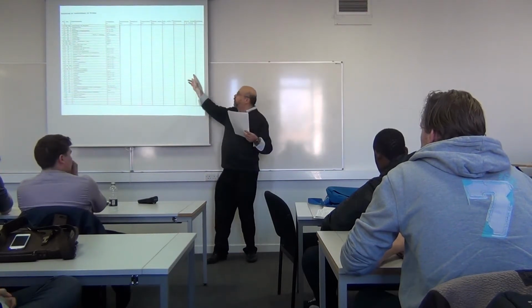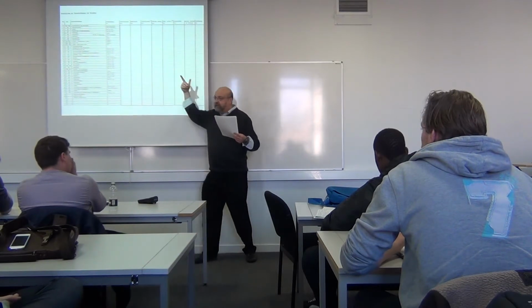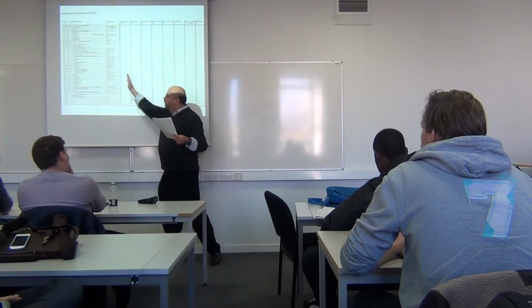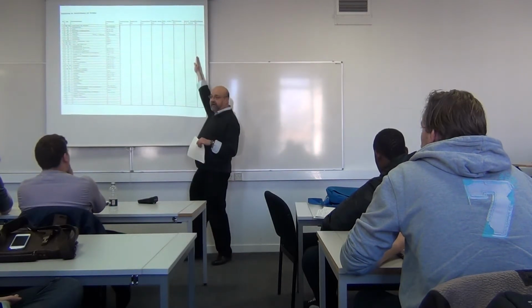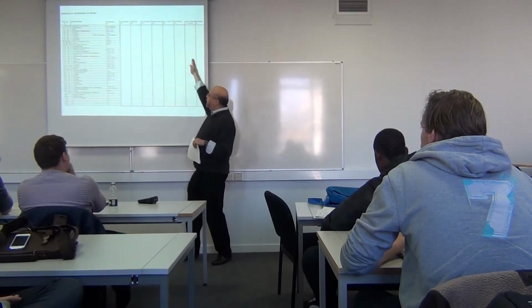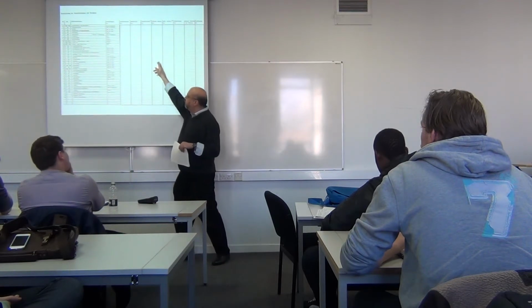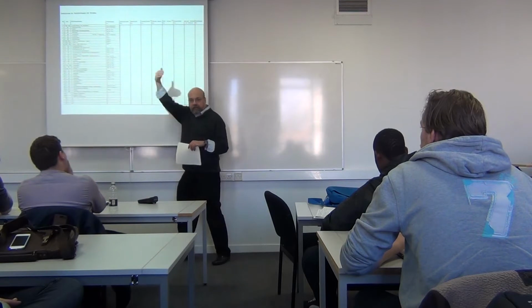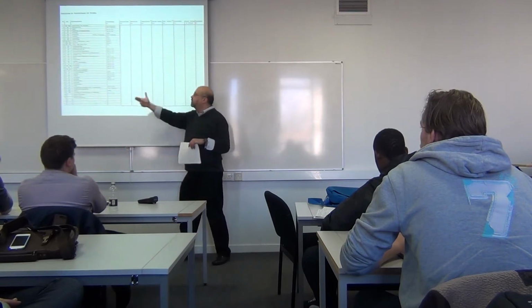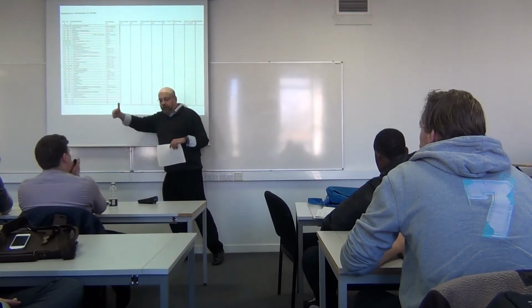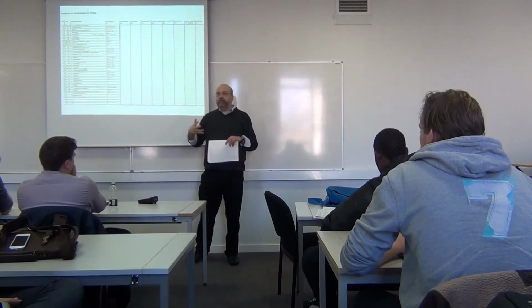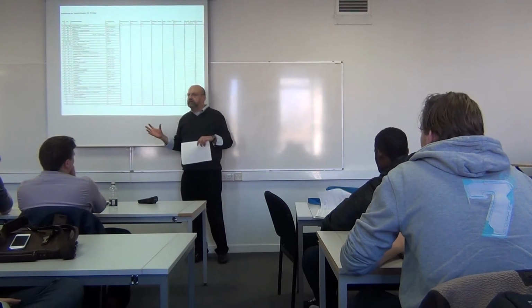So when I calculate it from the end, so to say, I know what this is, the main data, the fixed data, and then I know, okay, I have this time span from here to here for submitting the contract. I have this time for making the documents, for getting the biddings and so on.